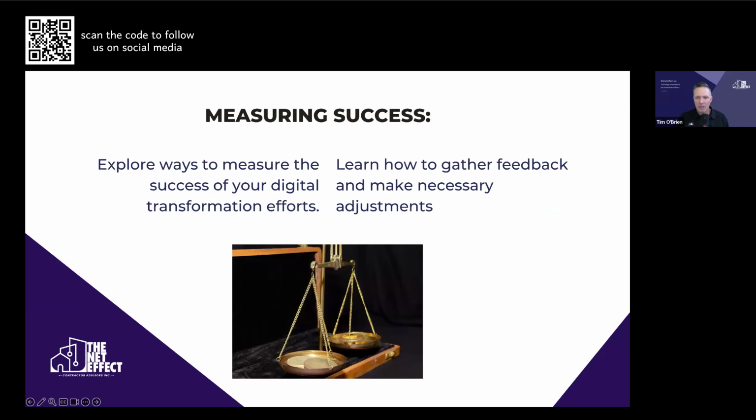Next, measuring success. Understanding your KPIs for the entire project at the front end is important if we're going to create a digital transformation. What are the key success indicators? What are KPIs? The first one would be adoption rate. You want to target 90% of usage within the first few months, or whatever your target is going to be, ensuring that everybody's on board and utilizing the system. So adoption rate is one solid, strong KPI that you want to measure.